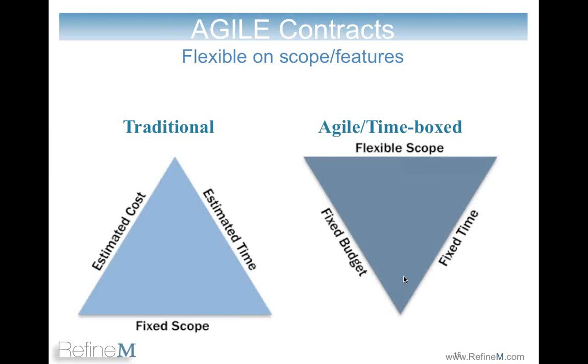budget and time are over, your project is over, and by that time you have delivered, if not all, then at least most of the scope and the items that are highly valuable to the customer. So if you didn't deliver 10% of the items, they were probably lower in the product backlog and lower in business value, which is all right, because instead of extending the entire project and delivering everything at the end, you already delivered it and the customer is using it. So this is a much better proposition for the customer.